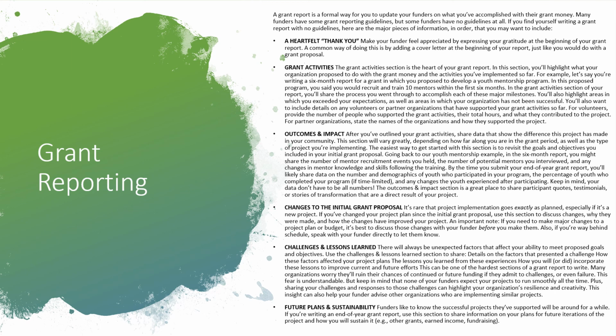If you had any changes to the initial grant proposal, you'd want to make sure you document those so that people know that there were changes. This can happen sometimes. If there are big, significant changes, where we're going to shift a lot of money around, you need to make sure you get approval from the funding agency before you actually do them, because some funding agencies are more flexible and some are not. But in any case, you would want to note the things that change, because projects rarely go exactly as planned,